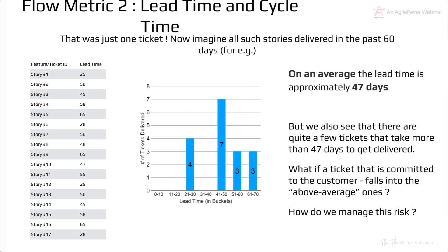That was just one ticket. If we look at all the stories, epics, and features delivered in the past 60 days, we can see a fictional data dump: story number one delivered in 25 days, story number two in 50 days, then 45, 65, and so on. Calculating the average, the lead time is approximately 47 days.